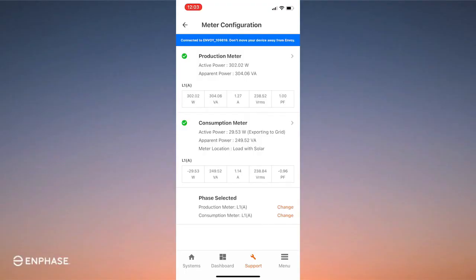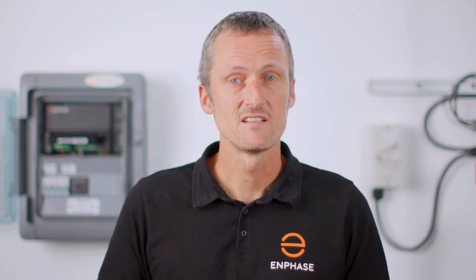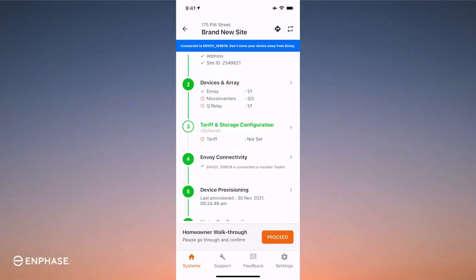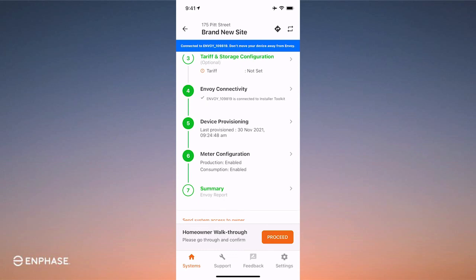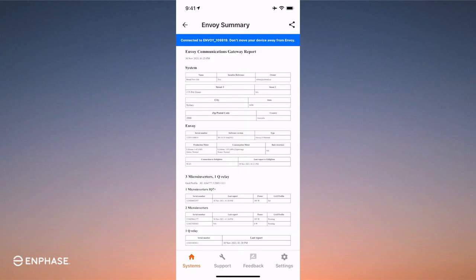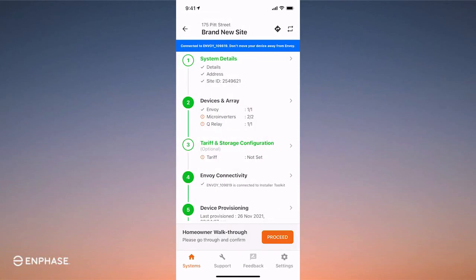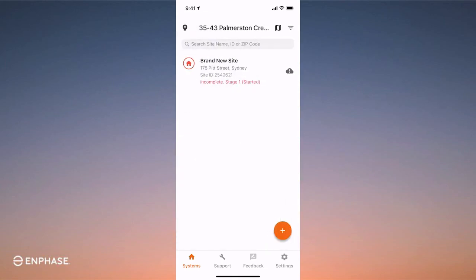Now review the app screen — we're nearly there. Look at your Envoy. What is the LED status? You want to see green, green, green and green. We can now be confident that your system is commissioned. Before we leave, let's go into Stage 7. Review the system summary, review the details and make sure that everything is looking perfect. All steps are green and completed. Now go back to your home page on the app. The final task is to check that the cloud indicator is green and confirm that the site details in the app are synchronized to the internet.